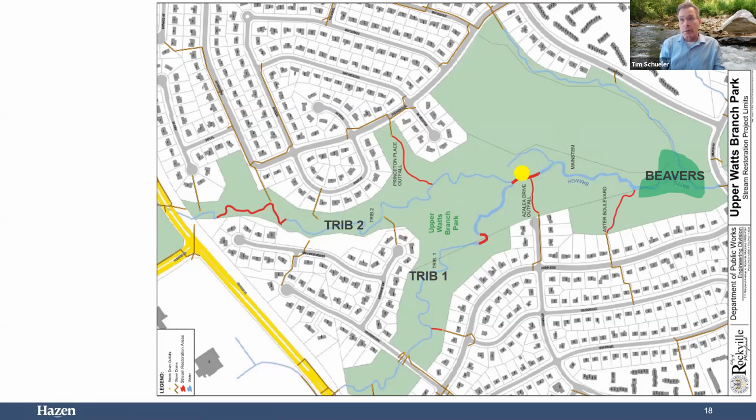Just a brief aside on that: one of the citizen community involvement items and a permit item was an archaeology study. This area had some Native American artifacts, particularly where the main stem area was. So we had something done called a phase 1 archaeology evaluation. I learned what that was, which was a preliminary analysis to see if there are artifacts of a sufficient amount and quality that a phase 2 evaluation would be done. That's what we picture, with people putting strings in a matrix, and picking up things and brushing them off.